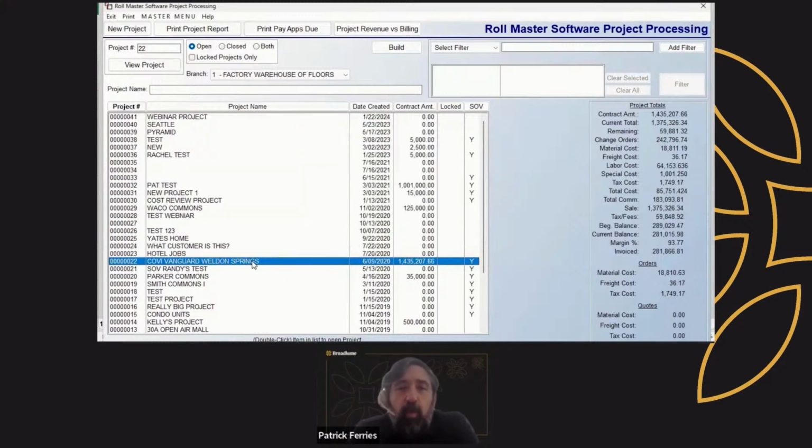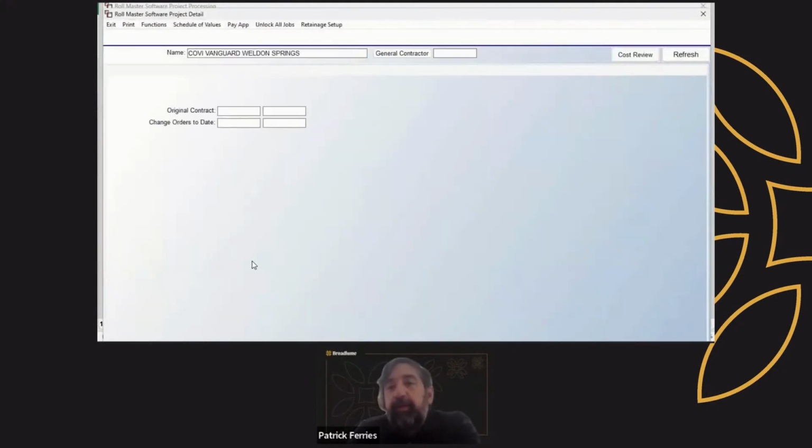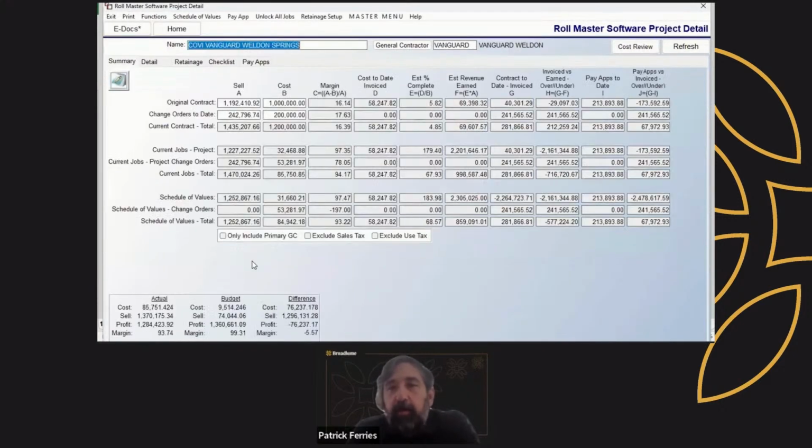So one of the reasons I care about over under is from the company accounting standpoint. That's what we just talked about. However, on a project by project basis, this is really good to know to see how you're managing your project. This is going to directly impact your cash flow. So in this instance, I'm way behind. And I'm really just looking at row 1 for simplicity here, but I'm way behind on what I've built out so far, which means I'm in a bad cash flow position. If this were the only project I had going on right now, cash flow would look really ugly because I've had a ton of expenses and I haven't been able to invoice for it yet.